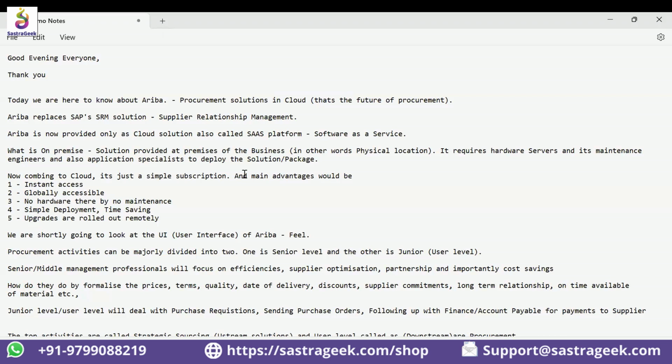Whereas if you want to spend on machinery, then you need to go into a lot of effort. What is your rate of return on investment? How long will the asset serve? How can we budget, whether we want to use this as a capital expenditure or revenue expenditure? What maintenance is required for that particular machine? Who are all the vendors, and what is their level of expertise in the market? Whether they can provide durability. A lot of things need to be analyzed. So then you have a strategy for purchasing different types of materials.